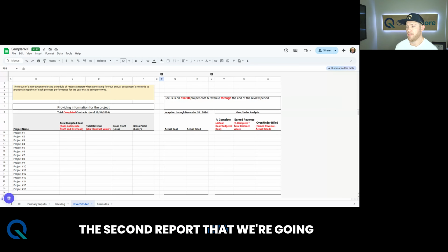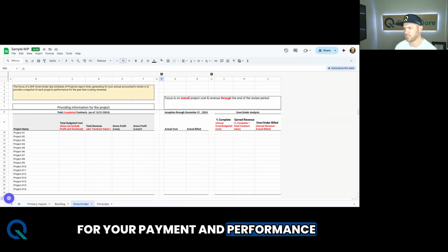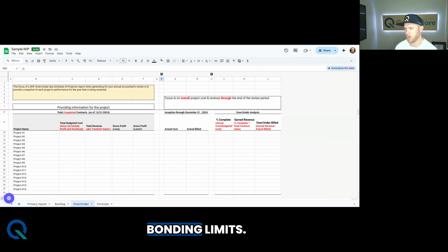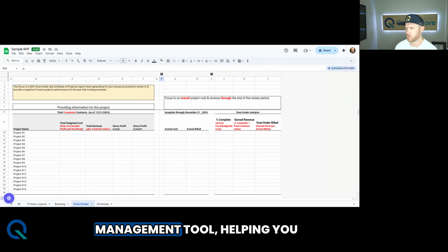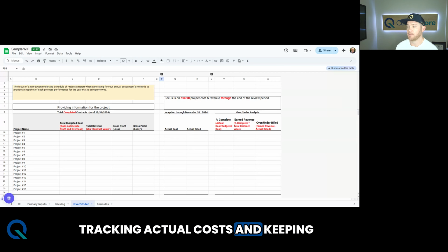The second report that we're going to hit on today is your over/under billing report. So this is your classic WIP report, the one that's used when qualifying for your payment and performance bonding, also known as your PMP bonding limits. At its core, this report helps answer what it sounds like. Was I over or under billed at the end of the year? Why that is important to know, we'll hit on in a minute as we build a WIP report. But it's also an excellent internal management tool, helping you evaluate how well your team is tracking actual costs and keeping up with progress billing.